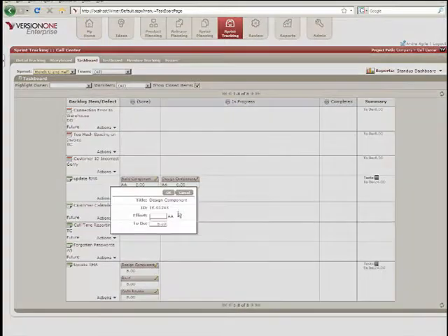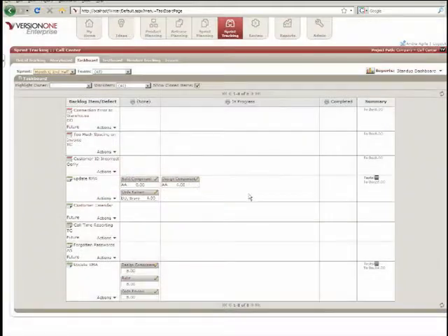So I'm going to go ahead and say, well, I worked on it for 4 hours. You would think I'd only have 2 hours left, but I think we underestimated that a little bit. So I'm going to say we have about 4 hours left. You always have to maintain that to-do because that's where your burn down comes from. And then you continue on to the next day, and each team member is grabbing those sticky notes or those tasks to put them in the appropriate area.